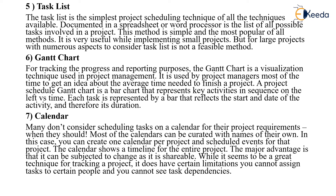The Gantt chart is used for tracking progress and reporting on the process. It is a visualization technique used in project management, helping project managers get an idea about the average time needed to finish a project. A Gantt chart is a bar chart that represents the key activities in sequence on the left versus steps. Each task is represented by a bar that reflects the start and end date of the activity and therefore its duration.